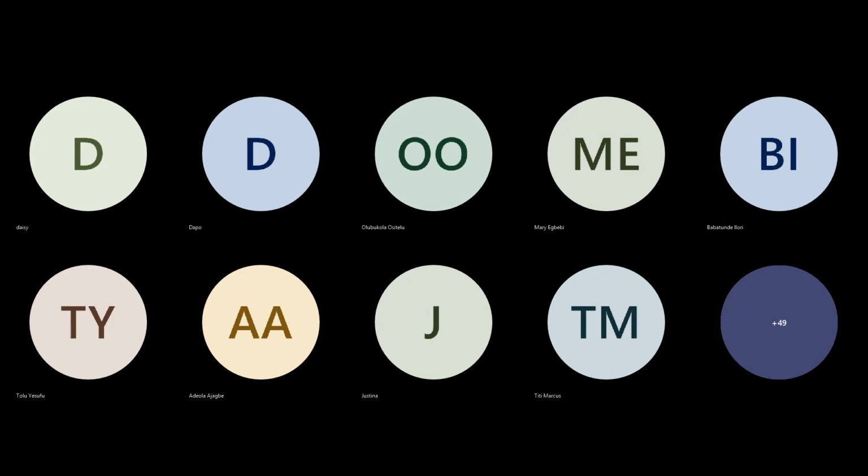But what would happen is, whilst we're developing in sprints, we already know that we have a release plan in place to say we want to release monthly, for example. So if we're releasing at the end of February, the BA starts, whilst development is going on, to understand for the release process what the acceptance criteria are that we need to meet for us to say we've met all the checks for the release process. Do you get what I mean? So we check those boxes, the BAs prepare those documents and submit them to the governance gate. So it's anti-pattern, to be honest with you.